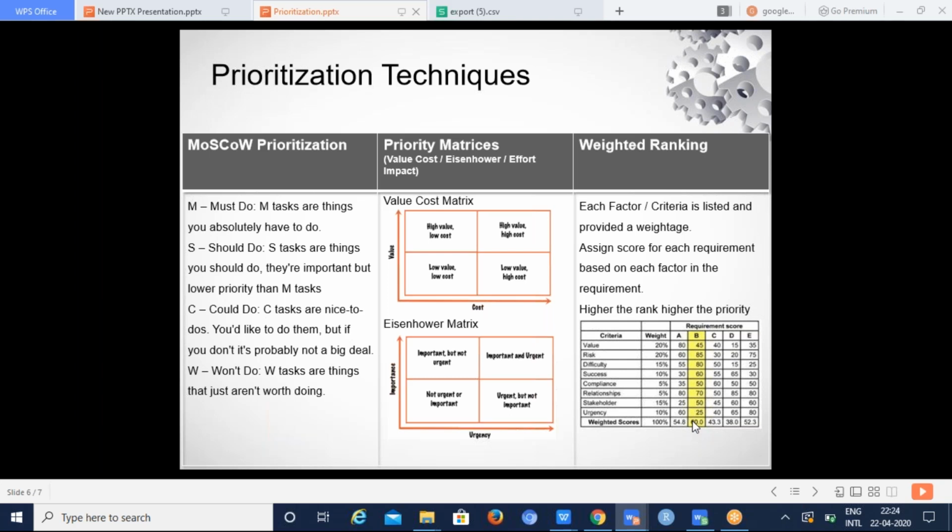I was saying about the concept called storyboarding. In Agile, we have a concept called storyboarding, where we group similar tasks and the tasks that are dependent on each other. When you do storyboarding, for example, you can consider a homepage as an epic because it's a bigger task, and in the homepage we can have smaller pieces like a banner, sections to list your products, and sections to provide promotional content.